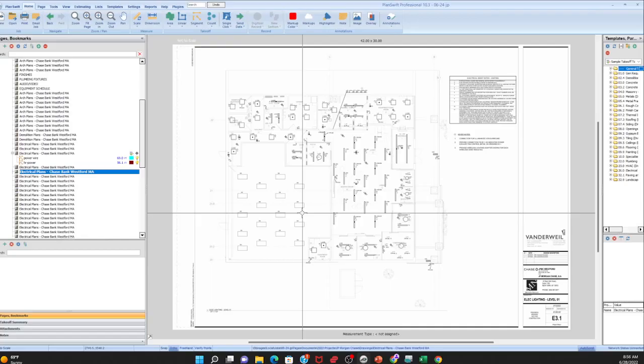Right, because the wire goes inside the conduit. So the conduit is holding 3 number 12s. 3 of the same wire connect to one thing. Because remember when we do our home run, we got hot, cold, and neutral. Each one of those gets a wire connected to it. So we have 3 number 12 wires running through that one piece of conduit. Right, exactly. You see, visualize that, because that's really what it is. It's 3 wires that's running in that piece of conduit.